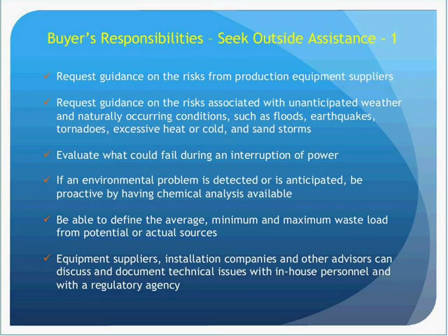One unique risk occurs when a supplier is selected to provide a proprietary product. Problems could occur if that supplier ceases production or can no longer provide that service for that product. Outside assistance can be useful for requesting guidance from manufacturing companies that supply equipment concerning any potential risk when they use that equipment or maintain that equipment.